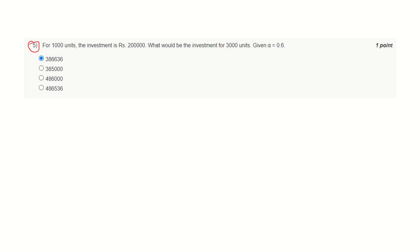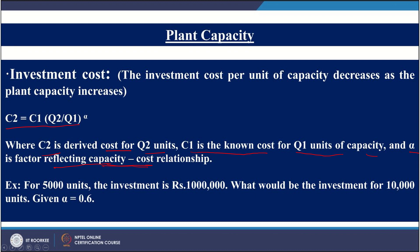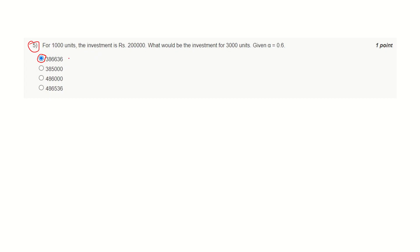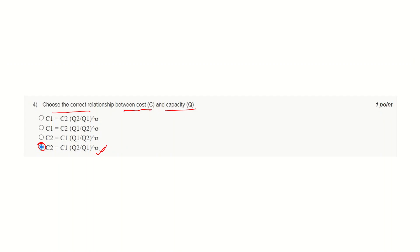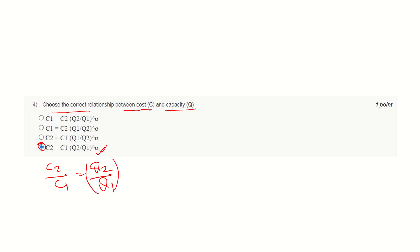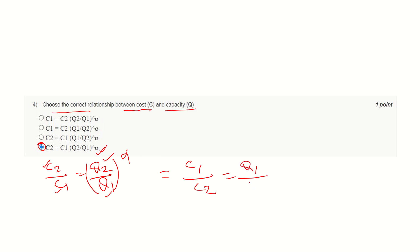Question number five. The correct answer is this one. This answer is based on the previous equation — the relationship between cost and capacity. For the sake of memory, we can write it as C2 divided by C1 equals Q2 divided by Q1 raised to the power alpha. You can also write this expression as C1 divided by C2 equals Q1 divided by Q2 raised to the power alpha. These expressions bring the same result.